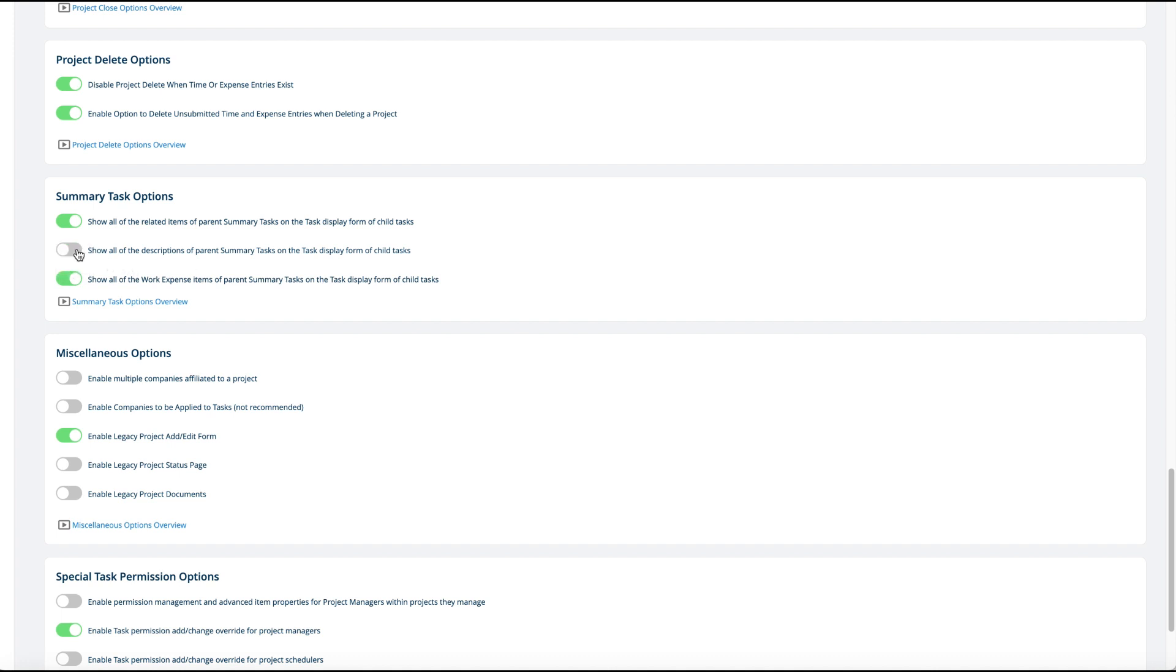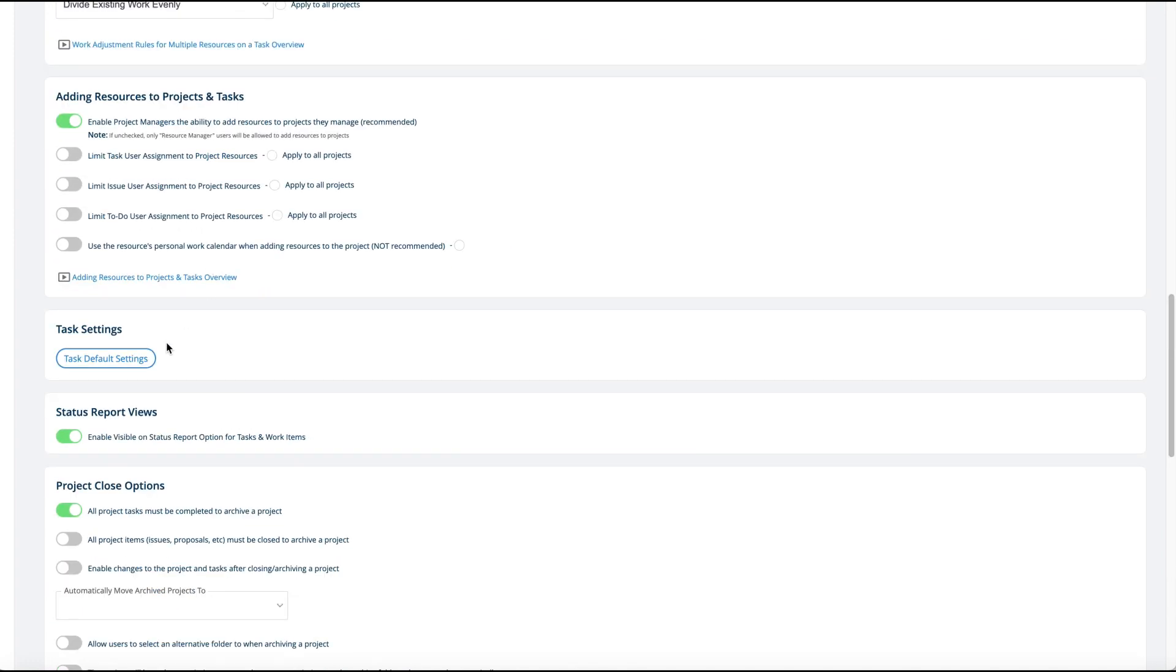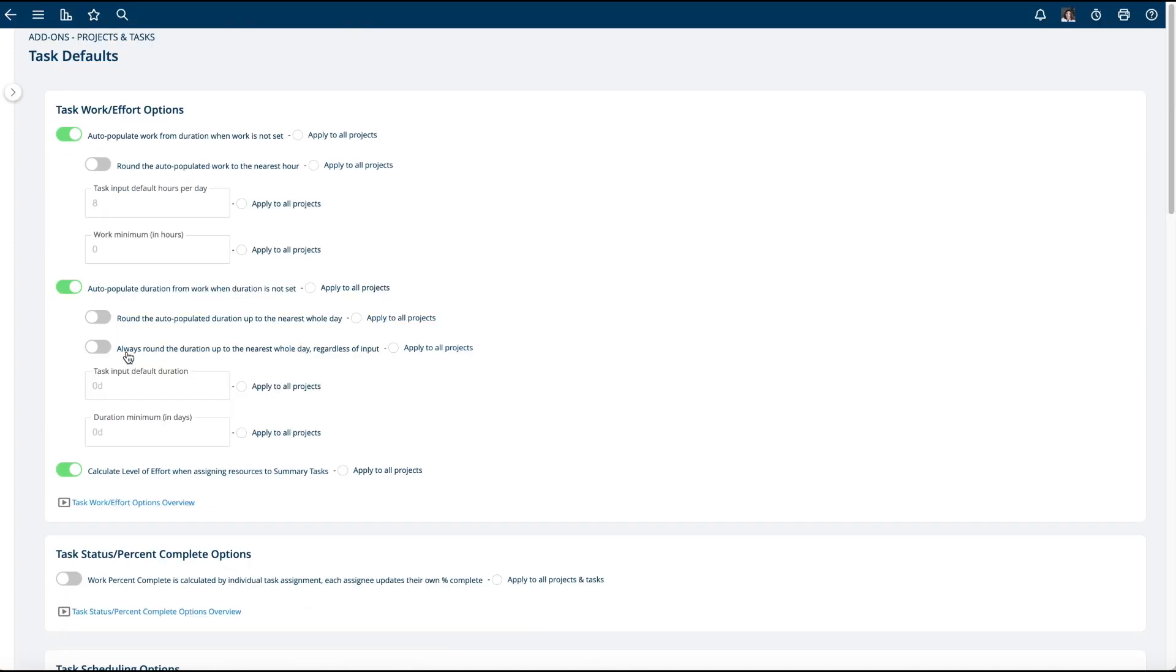There's also task default settings. In the task default settings you have options to auto-populate work from duration. That means when you put the duration in, it'll say one day is eight hours. And you could also have it auto-populate the duration from work, so it'll do the flip side.